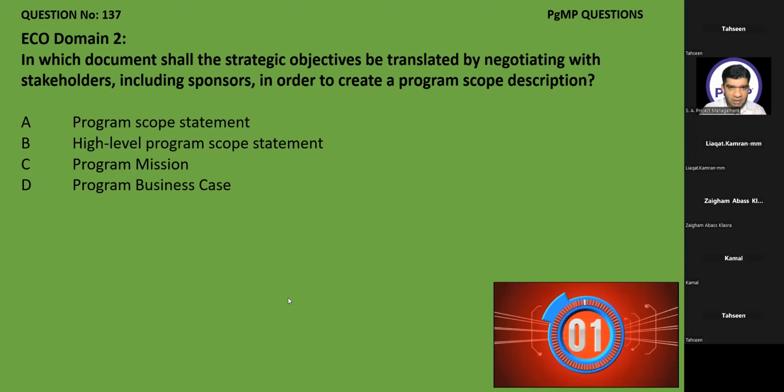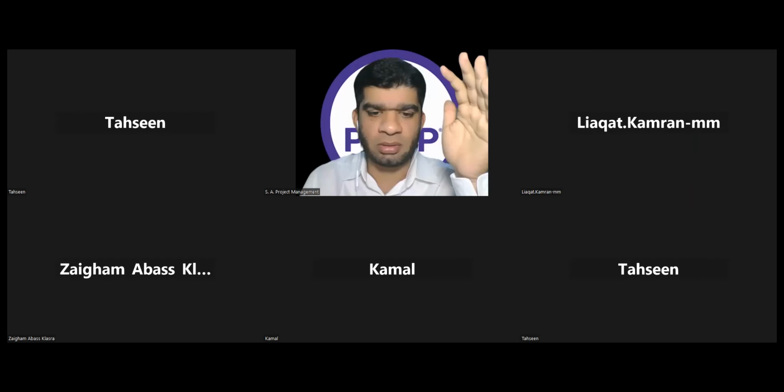Someone has selected A, someone has selected B. So what is the keyword here, Kamran sir? One keyword is program scope description. That tells us it should be a program scope statement. The only question is whether it's only the program scope statement or the high-level program scope statement. As we are talking about starting from the strategic objectives, it is coming from the initiation phase of the program. It is very early. So the correct answer is B, high-level program scope statement.